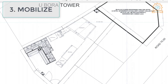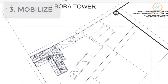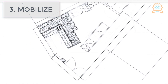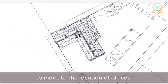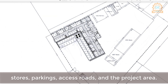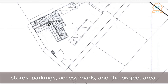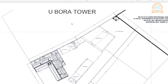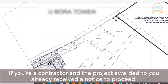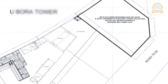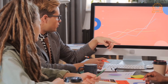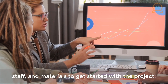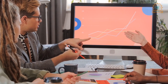Step 3: Mobilize. Before mobilizing, you should prepare a mobilization layout plan to indicate the location of offices, stores, parkings, access roads, and the project area. If you're a contractor and the project awarded to you has already received a notice to proceed, then this is the appropriate time to mobilize your equipment, staff, and materials to get started with the project.